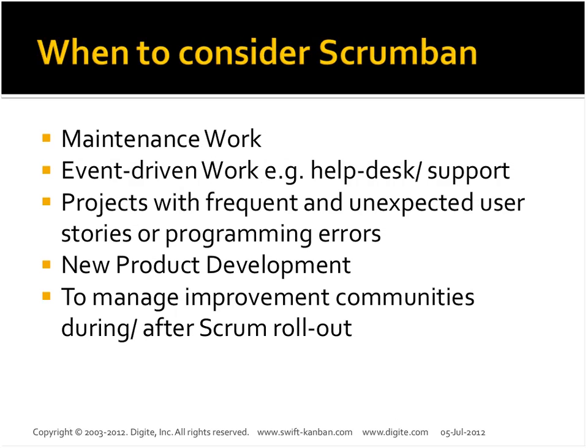So typically Scrumban, the way we have seen the usage, is definitely helpful for maintenance work, because in maintenance work typically you don't plan sprints that way. If a critical bug comes in you have to fix it, which throws off your sprint planning. So you could always use Scrumban, and instead of a fixed iteration scope, you can start with some high-level planning, but let the customer prioritize some of the key features or bugs that need to be fixed within a sprint, rather than fixing the sprint scope and not allowing any further changes.